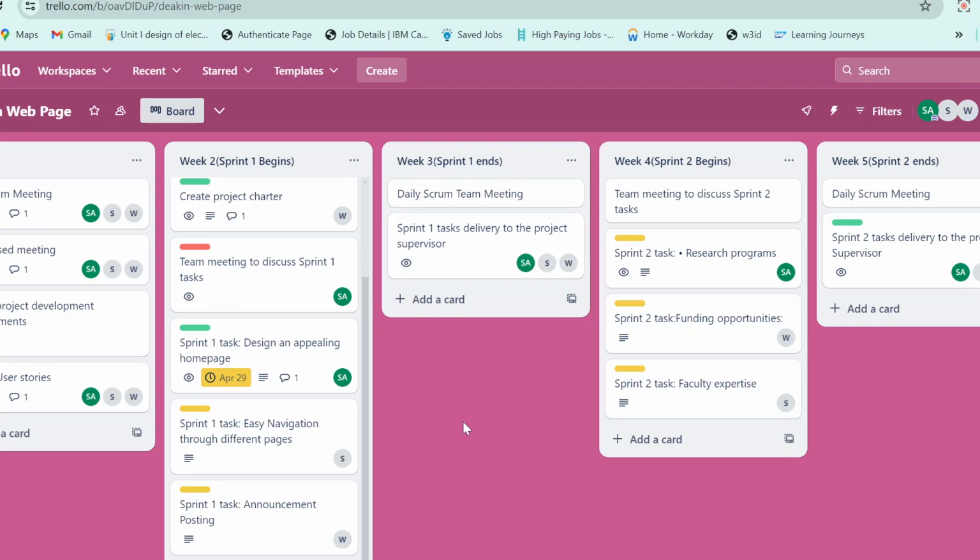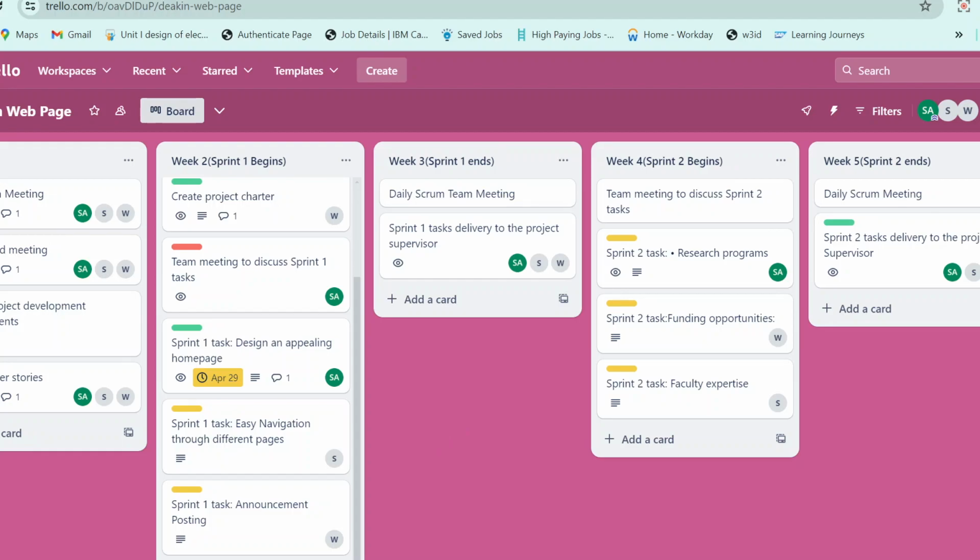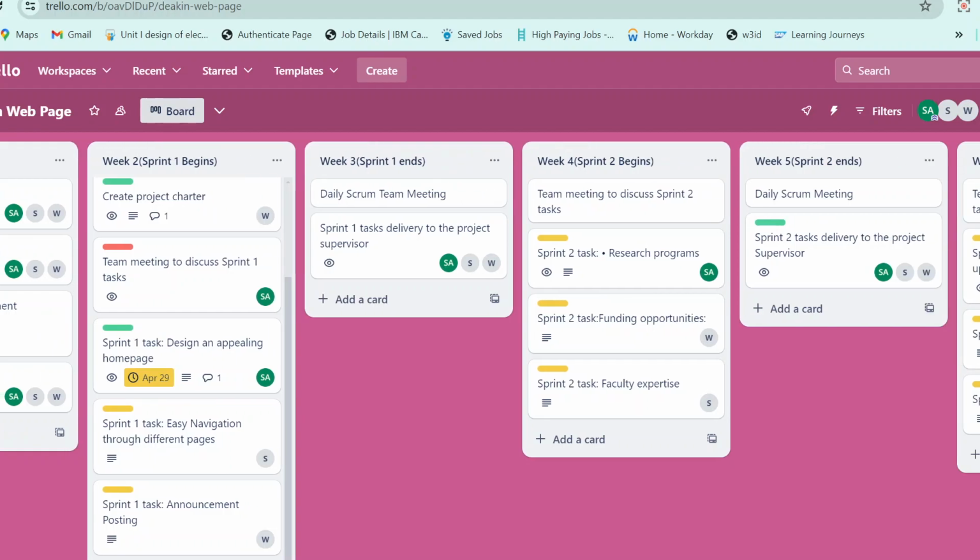During the planning of the tasks, we faced a lot of difficulty when assigning them, because all of us are new to the module and we were not so aware of the tasks, like how they are going to be completed in the upcoming weeks, whether they will be completed or not. All these doubts were clarified when we started to plan our user stories into smaller tasks. We assigned the tasks with respect to the strengths and weaknesses of our team members, and we gradually maintained the difficulty level of the tasks by dividing them equally into the 4 sprints.